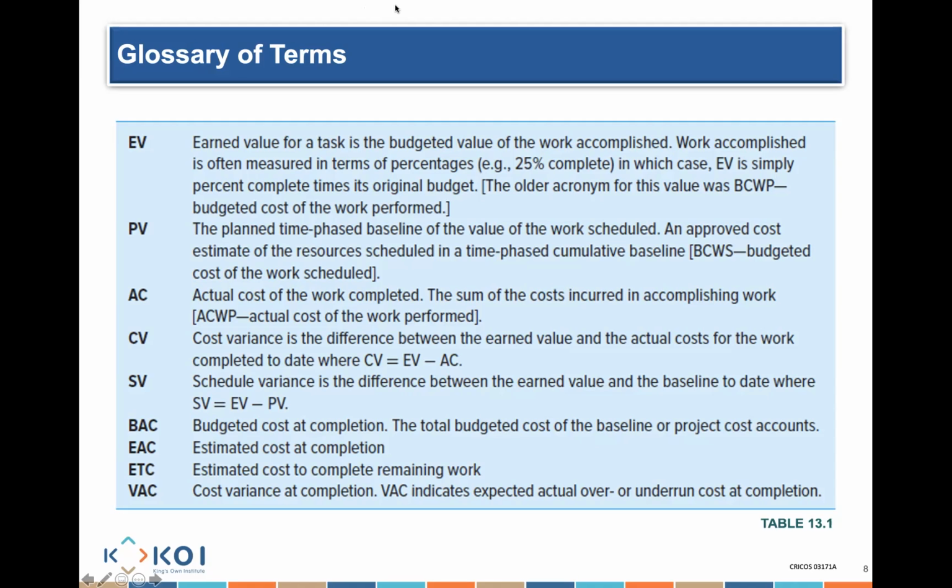One day, 10 activities. So daily, what's that, my friend? No, sir, I'm asking, there are 10 activities, right? 10 activities that you're going to do, each one a day, and each of them is going to cost you $10. $100, 100%. So that $100 over the 10 days duration is what we call budgeted at completion.